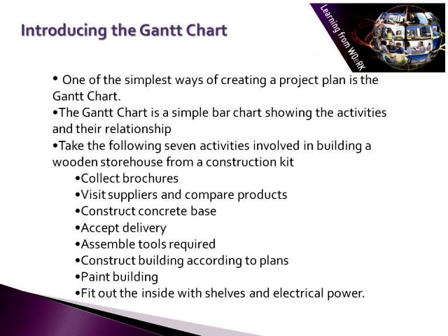As an example, imagine you want to build a store at the back of your house. You think a wooden structure would be the best, as there are no planning problems. You would first start off collecting brochures of suitable construction kits, then visit suppliers, compare products, and then make your decision. The concrete base could be constructed once you've made the decision and have the measurements. You would then have to take into account a delivery time, then assemble the tools once you identify the work that needs to be done.